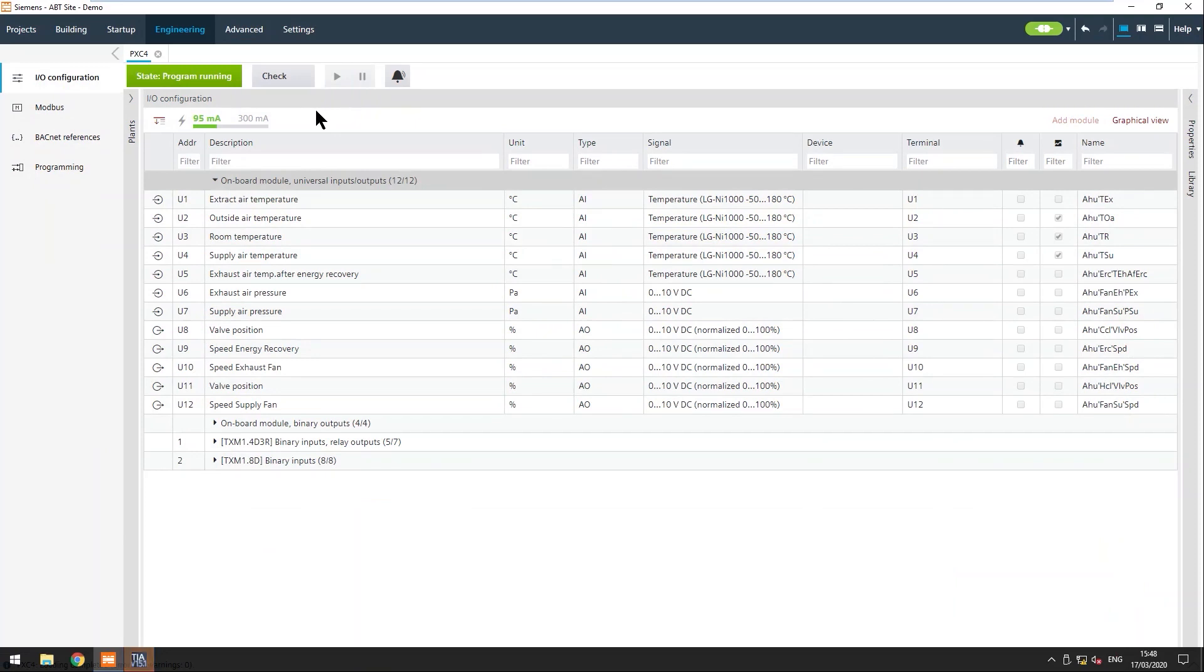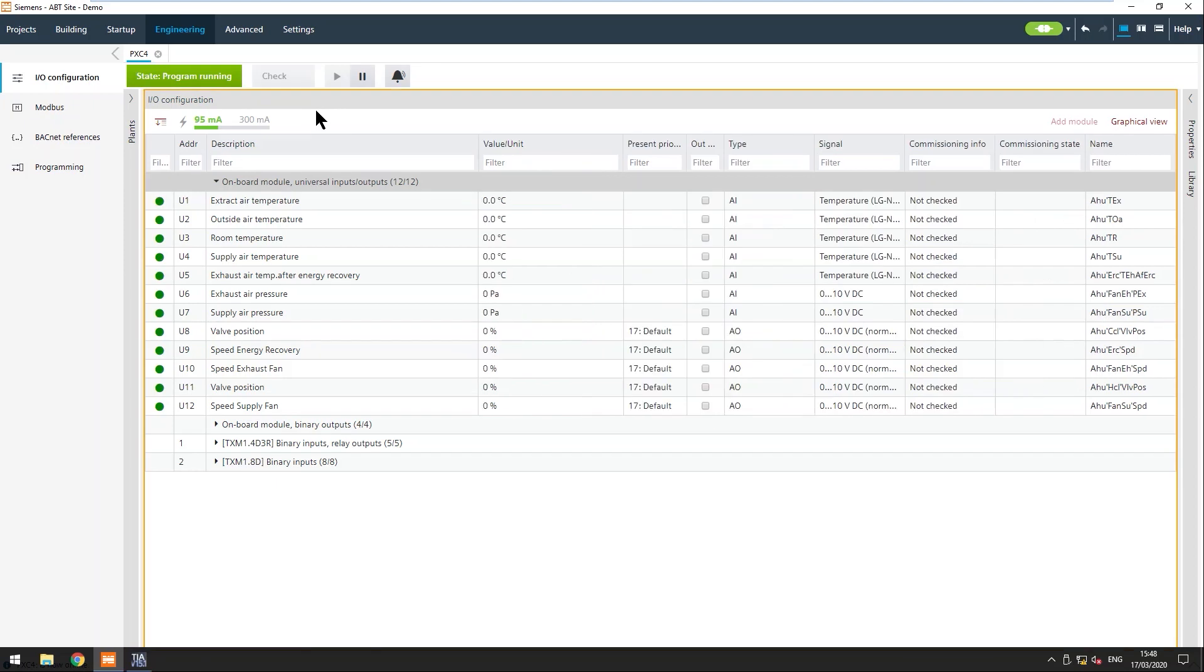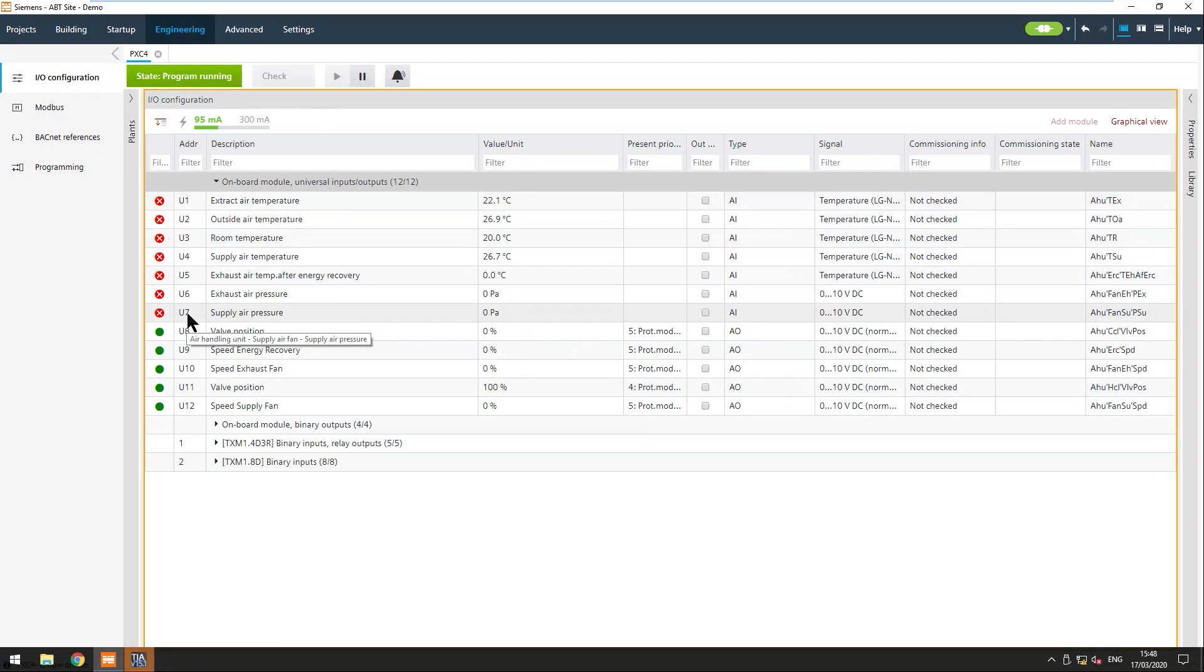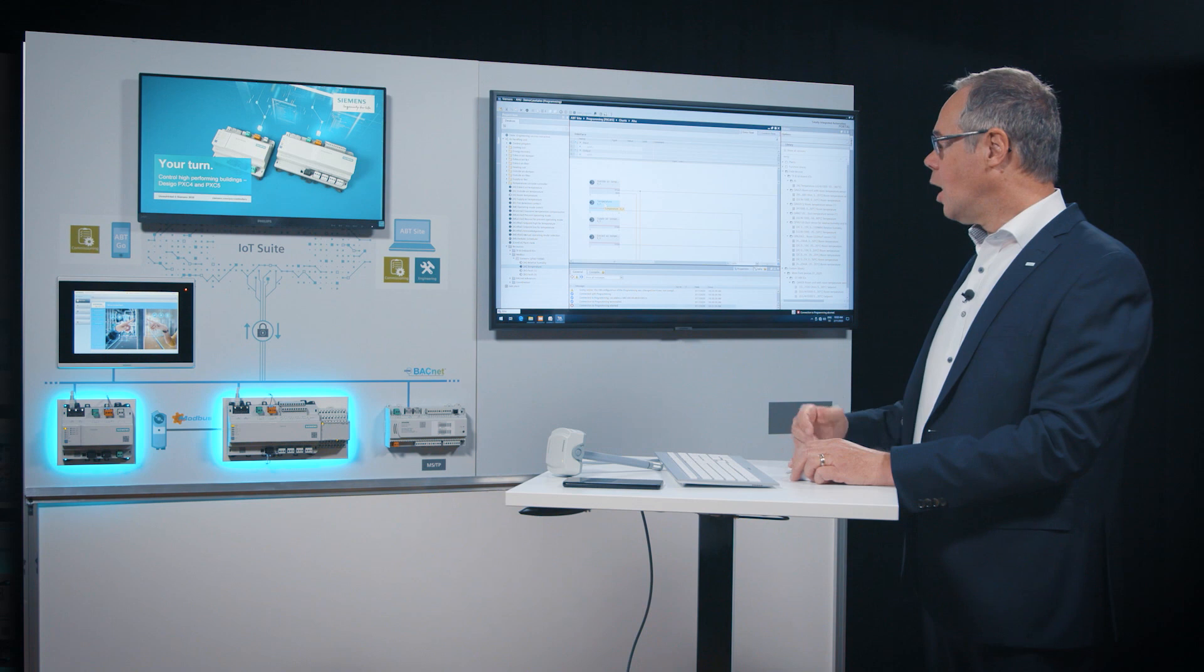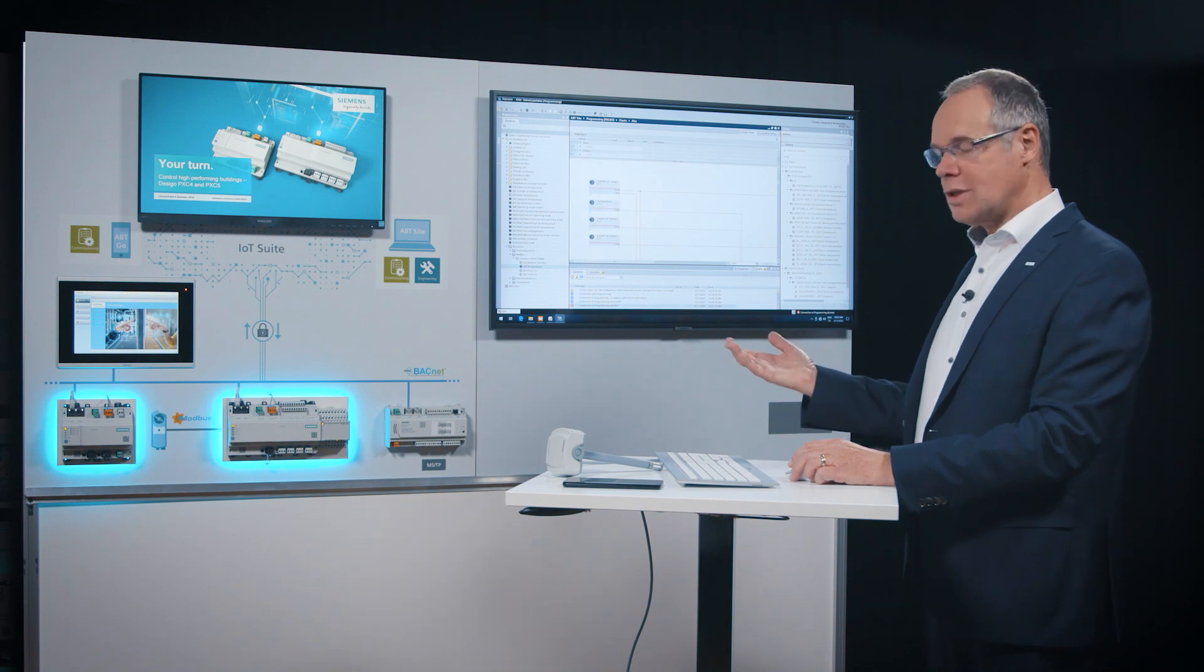We see on the green bubbles here or the red bubbles that green is connected now. U1 to U7 is not connected so I have to do there some commissioning, some physical wiring.